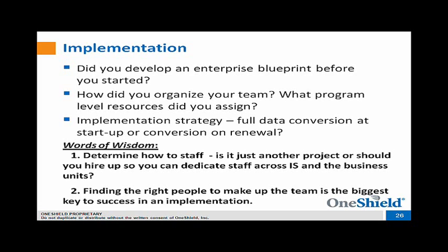And we want to talk about data conversion. So Derek, when it came to your data conversion strategy, if you can share the route that the Dominion had decided to take. Yeah, with our data conversion, it's probably one of the things you hardly ever see in the industry. Most of the times you do the conversion on renewal that takes over a year. We had a very interesting product where we actually chose to go against that grain, and we did a conversion. We call it a big bang conversion. Over the weekend, we converted the whole book of business over.